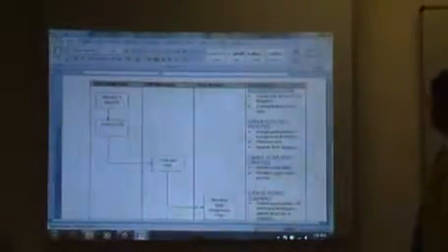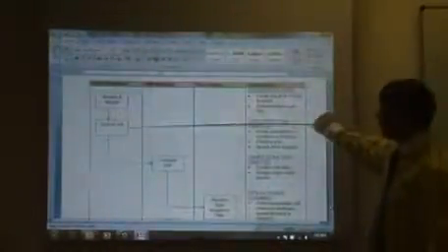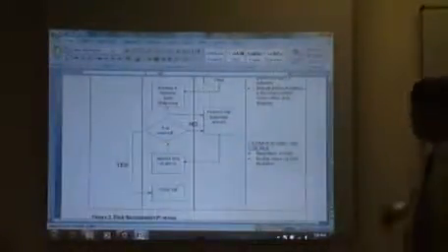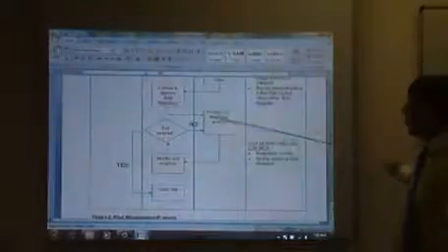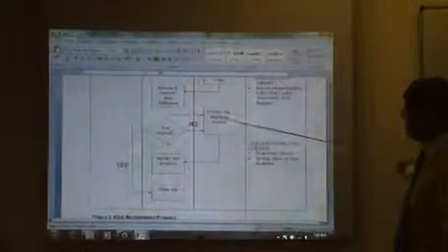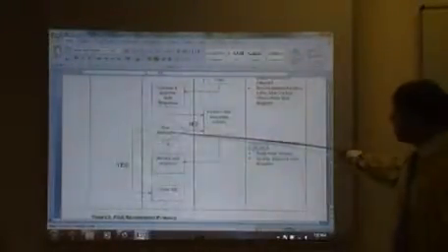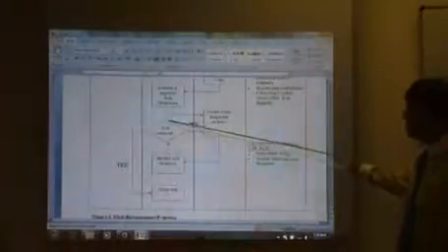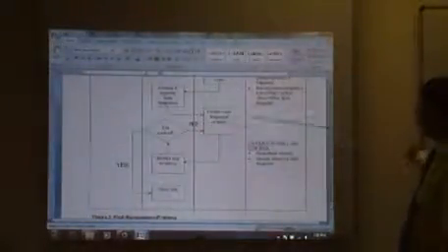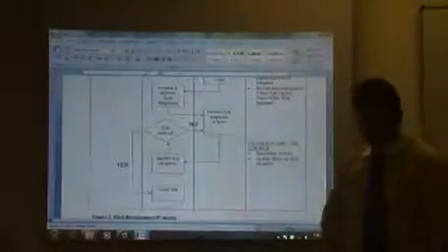And there you can clearly see risk identified, qualitative and quantitative, and that is how the process runs. Identify and log the risk, assess the risk, evaluate the risk, develop risk response plan, and if you go further down, you can clearly see this is a process flow chart from a quality management point of view. If you have identified the risk and your risk is resolved, yes, you will close the risk. If the risk is not resolved, no, you will go back to perform the risk response actions, etc. And finally,